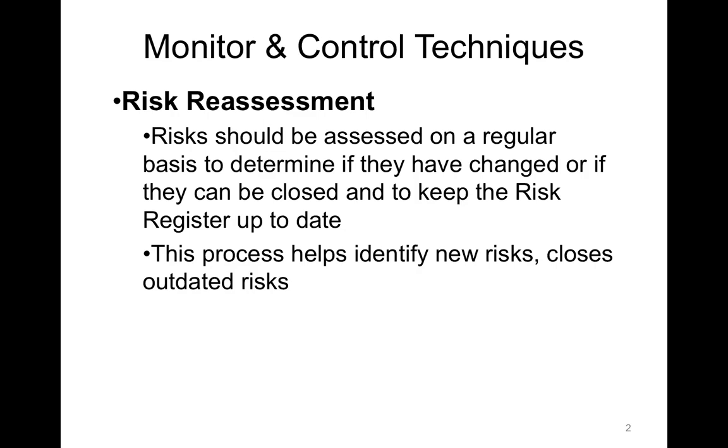So for example, risk registers don't get updated. They're not used as tools. It's more of a formality, more of a requirement because that's what the project manager is expected to do. But the risk register is useless, and a risk matrix, these are useless to the project manager unless the project manager actually uses them as a tool to manage risk. So risk reassessment allows a project manager to keep the risk register fresh, keep it up to date, and to move risks in terms of the severity in and out of different categories of severity, and also to eliminate certain risks and, of course, establish new risks in the project.